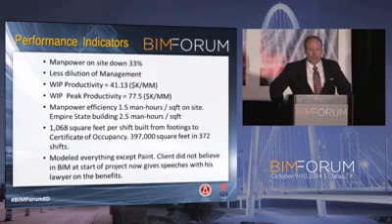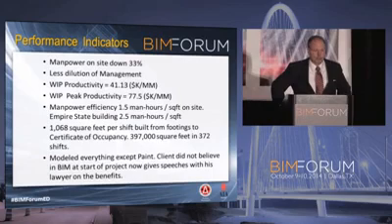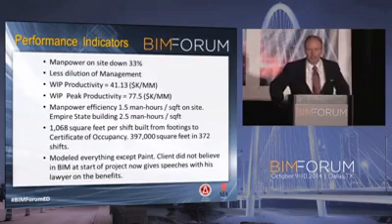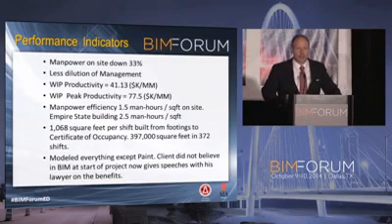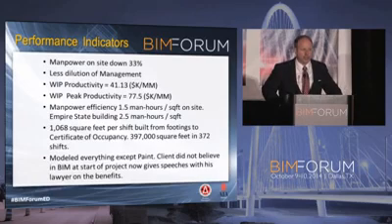CFE did a study, started one in 2009. What would it take to build at 1,000 square feet per day? That's what they do a 737 at Boeing. So imagine your job that you're on from the time that the mass excavation is complete, divide it by 1,000, and that's how many shifts you have to build it. We were able to do that job at 1,068 square feet per day, Class A office space, turn the key, hand it over, and they moved in 5 days later.